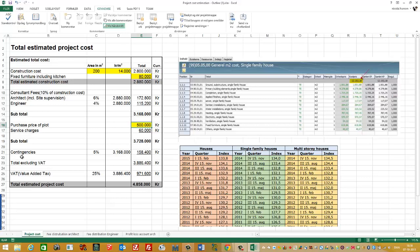Then I have the contingencies, which is 5% of the 3.168 million Kroner. So the 5% is from this subtotal. Then I have a total price excluding the VAT of 3.886 million Kroner. And then I add the value added tax, which is in Denmark 25%, and that gives me a total of 4.858 million Kroner.